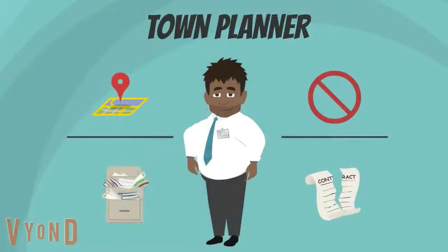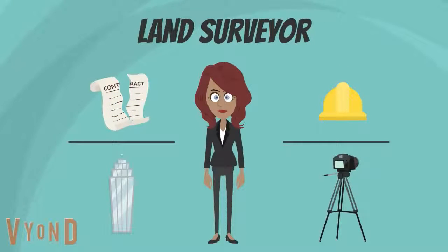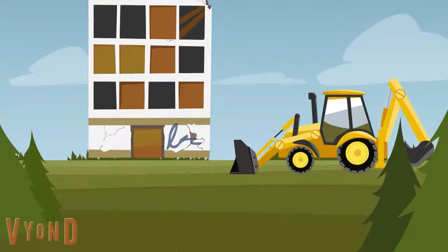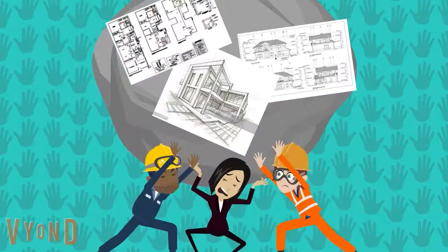The town planner helps to draft and review the planning for the applications, such as preparing the policy or guidance documents for the subdivision process. The land surveyor prepares a plan for subdivision and other details needed for planning the subdivision process, as well as the documentation procedure under the Subdivision Act 1988. The demolition process will start when the proposed subdivision is approved.